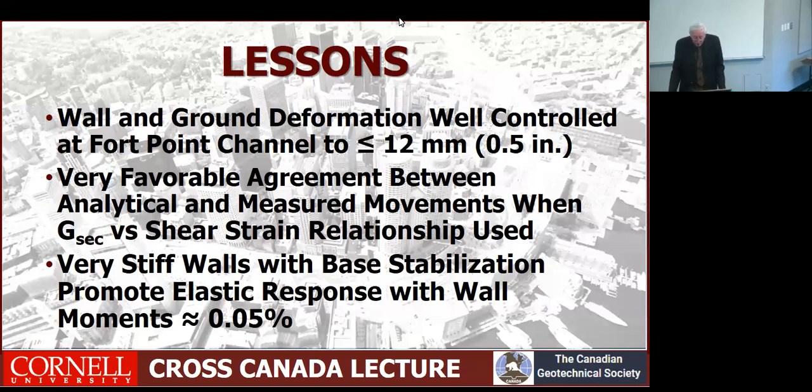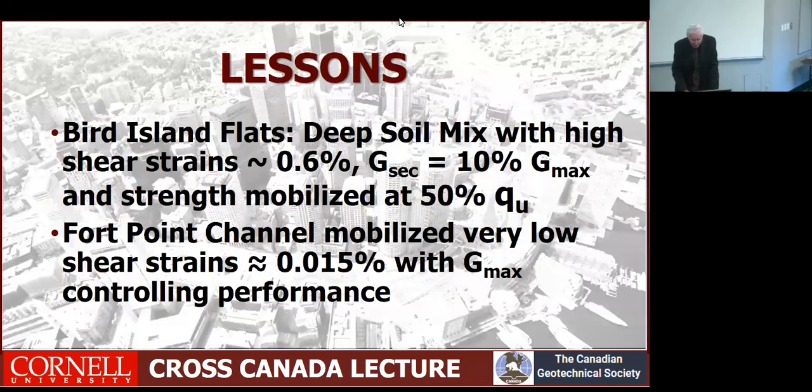The wall movement was eventually controlled to less than 12 millimeters, with a very favorable agreement between the analytical and measured movements, and very stiff walls with base stabilization promoting wall movements to approximately 0.05%. And then finally, the Bird Island Flats was a deep soil mix solution done under duress. We were holding up a $275 million project, which was critical path.